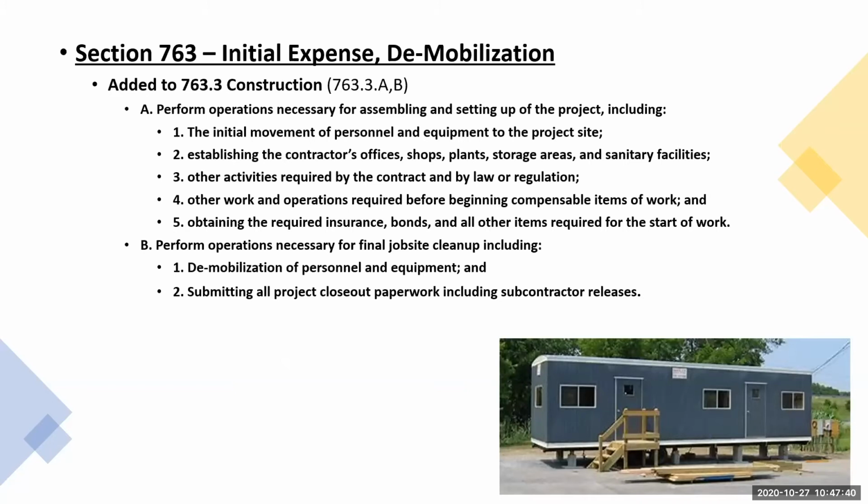All that's in the spec there. You can read that in more detail. For demob, for final job site cleanup, it's basically demobilizing personnel and equipment and submitting all project closeout paperwork, including subcontractor releases, in order to meet the requirements of that spec.